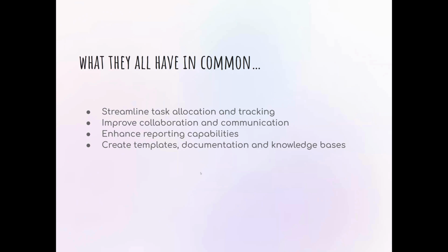So it's about what you're using the tool for as far as communication and reporting, and then what additional features are important to you. For me, when I had no choice but to use Asana, what I made peace with was that their templates are the best by far. The ability to build a template, if you're not quite sure what goes into a status report, it'll give you that list of components. You only have like 6 options to choose from. So really what you're picking is what to leave out and what order to put them in. And then once you pick those components, it'll prompt you again. So if this is your milestone chart, what are your goals? What are your deliverables? If this is that executive summary, what is that elevator pitch, 3-sentence explanation of what this project does?